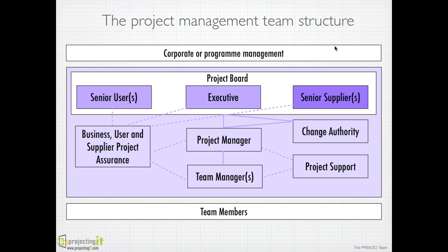So, what it actually means is each role is compulsory. You can't do away with any role. It's just that you can combine roles and assign it to one person on small projects. Like if I'm running a small internal project and I don't have enough bandwidth to assign all roles, then I can combine some roles and assign it. Which roles can I combine and assign to the project manager? So if I'm playing the role of a project manager, which other roles can also be assigned to me?